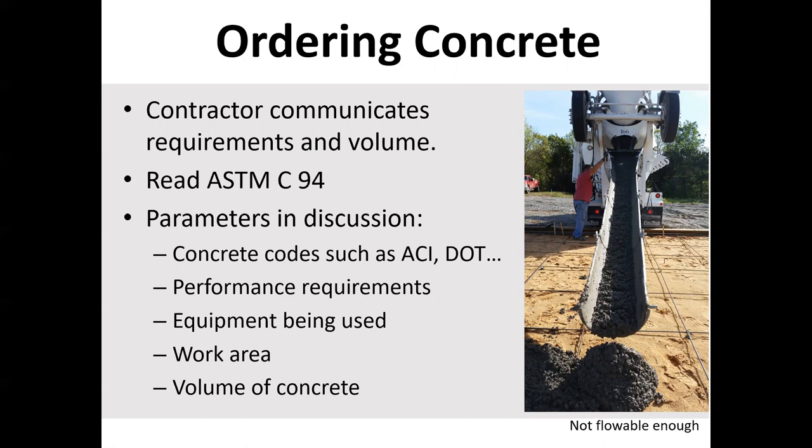We talked a little about ordering concrete in the previous lecture. If you're a contractor, make sure you estimate your volume and overestimate how much you're going to fill into your forms. Make sure you read ASTM C94, the standard specifications for ready-mix concrete — it will help you drastically to understand what's required when ordering, testing, and batching concrete. It could really open up your eyes as a contractor. Please read that standard. The concrete code, such as ACI, and if you're doing a DOT transportation job, make sure you communicate the concrete codes when ordering.